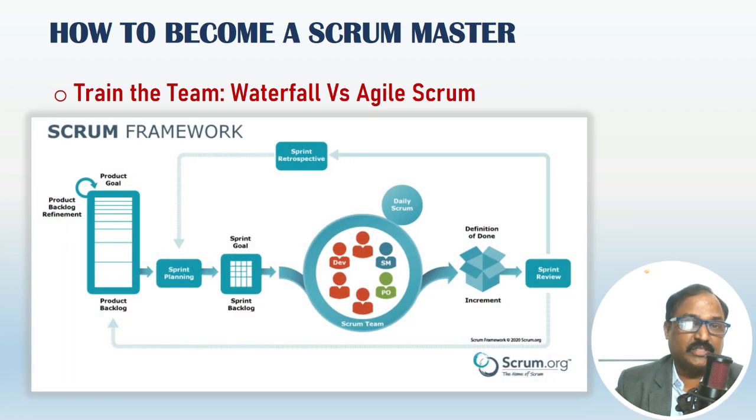Agile Scrum is a flexible iterative approach that delivers the project incrementally, that is, through sprints. Each sprint is typically 2 to 3 weeks in duration. Every sprint delivered contains independent workable items. The team should understand this approach and work towards sprint completion as per the timelines. Don't have the mindset of the Waterfall approach. Waterfall has a bundle of tasks in each phase and enough time for implementation, and the actual production deployment happens at the end of the project or at the end of the phase. Agile delivery is a continuous process through sprints with the help of DevOps CI/CD pipelines.